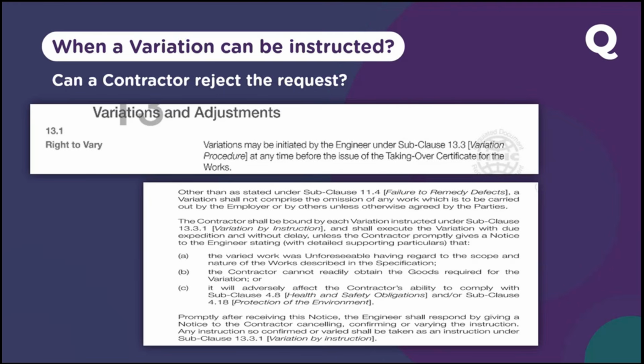But still he is a main contractor, so he can do this work by appointing a subcontractor under him, right? He can appoint a subcontractor under him, but what about the complications he is going to face? He doesn't want to take the risk, because he will be appointing, say, an infra contractor, who sometimes will be more powerful than him and won't listen. As an experienced guy, he will know the complications of that.